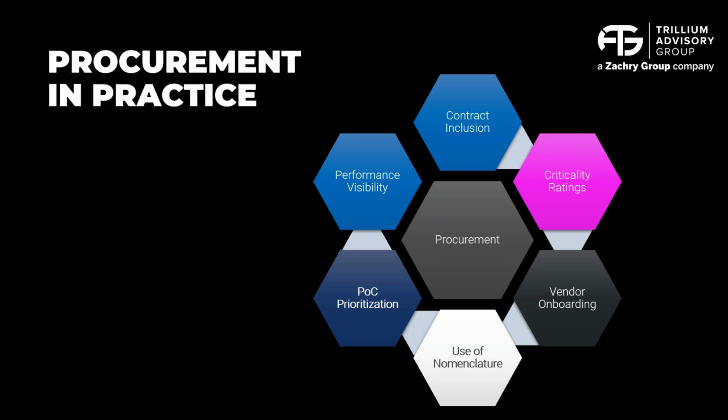Again, the real effort that they've got to expend in order to get us things that we can then build and install. The VWP, or vendor work package, easily ties deliverables into the overall schedule through the use of the EWP, CWP nomenclature. The only thing that's changing is that V on the end, the leading letter there to tell you who's responsible for it. It also makes a cleaner tie to see any early impacts of the path of construction, as you said earlier, Candace. And finally, by having the vendors build their schedules into a format that supports the overall construction schedule, we're able to more effectively monitor and manage their performance.